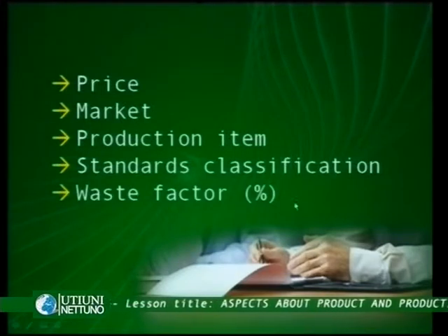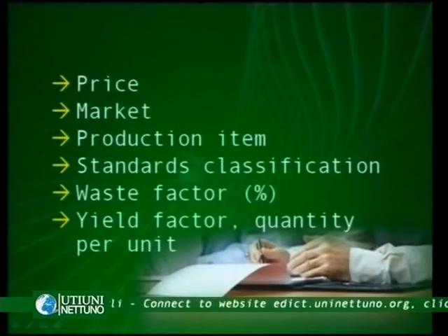The waste factor is very important since, as we were saying, there is a difference between the nominal and the feasible usage of materials and supplies. So, according to our level of productivity or reliability of our plant, we should operate on this waste factor as well. Then we have the yield factor, which is the quantity per unit.